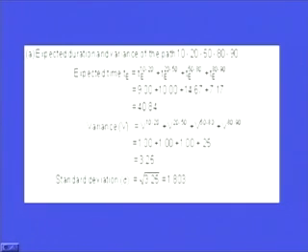period of time. Maybe for each and every activity the time is not deterministic, the time is not constant, it can take any value within the range varying from the optimistic time to the pessimistic time, and that is why there can be a large number of critical paths that may be there in one particular network. So multiple critical paths are there, that is why we need to calculate the variance and standard deviation.